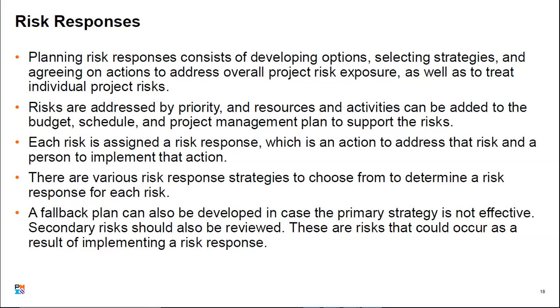In the event that your risk trigger has occurred, the occurrence is very evident and the risk event is occurring, and you've implemented your risk response in terms of the strategy that you want to use, after that whole scenario there might be other risks that originate from that process, and those are called secondary risks. The set of secondary risks you get from that scenario needs to be reviewed, analyzed, and planned for too.